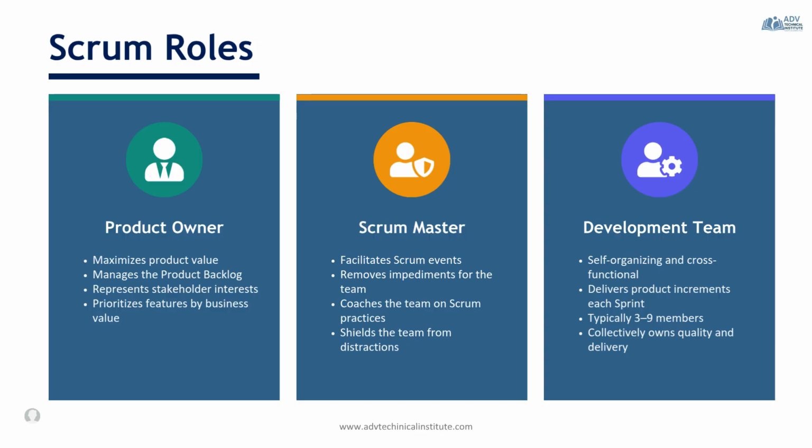Then we have the development team. It is a self-organizing, cross-functional team, meaning they have all the skills needed to deliver an increment without depending on outsiders. The ideal team size is 3 to 9 members, small enough for agility, large enough for capability.